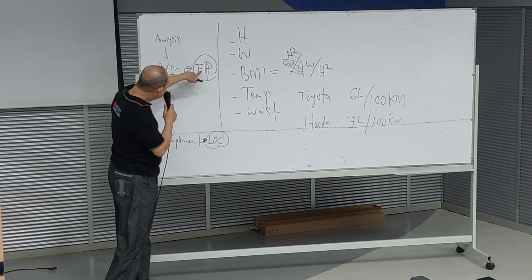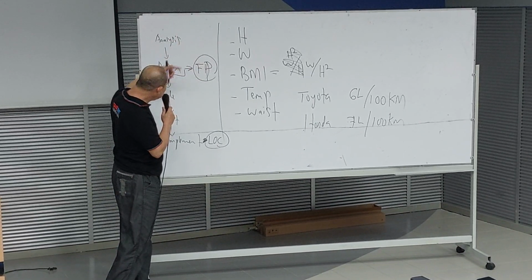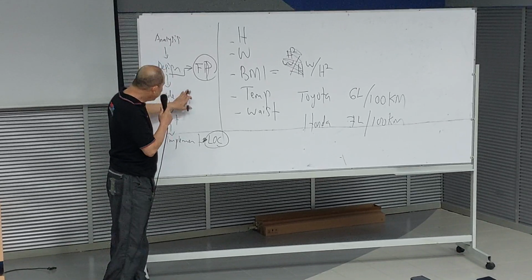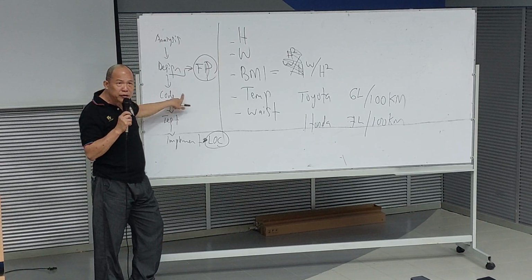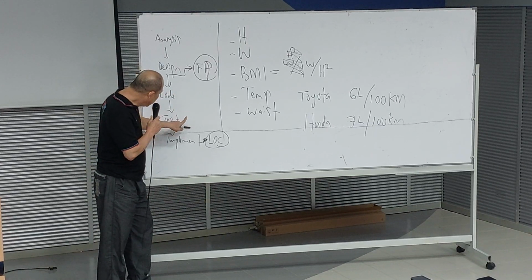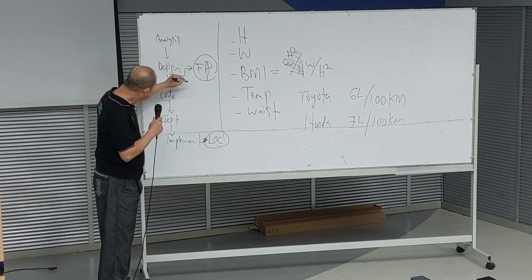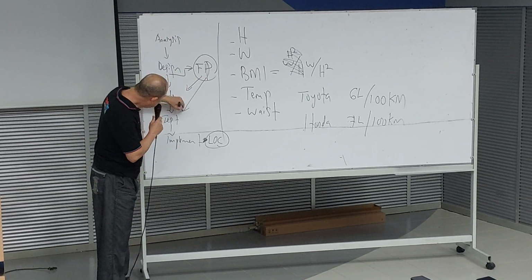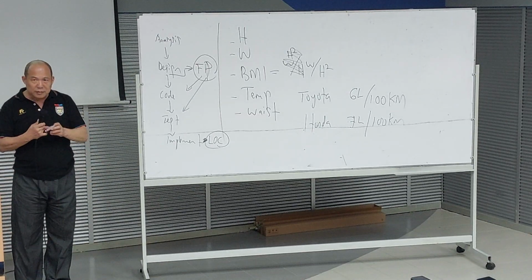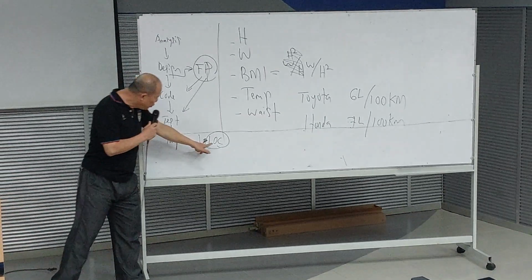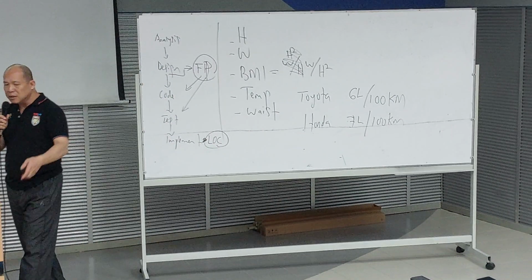So if you know function point at the early stage of the project, then you will be able to accurately estimate the amount of effort needed to do coding and testing. It will help you here. So lines of code can be determined after the project ended or late in the project.